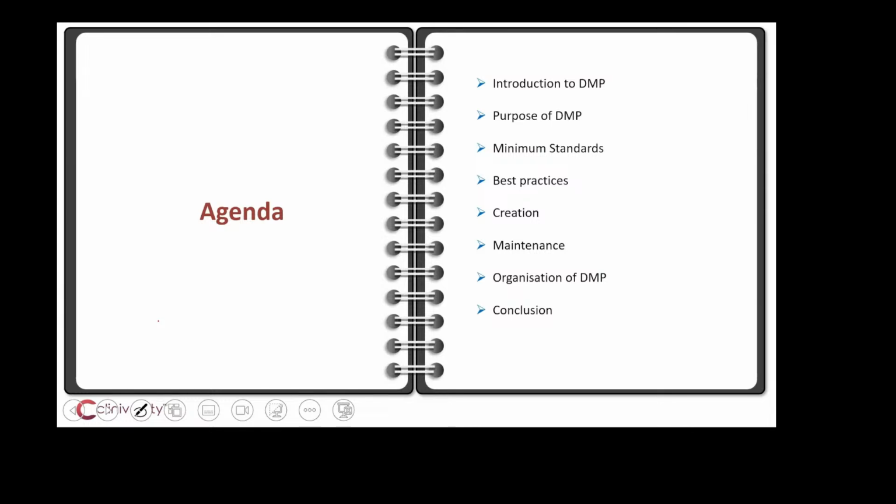In today's world, DMPs are considered industry standards. At the beginning of a study, the DMP provides a focus for identifying the data management work to be performed, who will perform that work, and what is to be produced as documentation of the work. During the study, the DMP is updated as key elements of the data management process change so that at the end of the study, the DMP provides an accurate record of how the study was carried out.